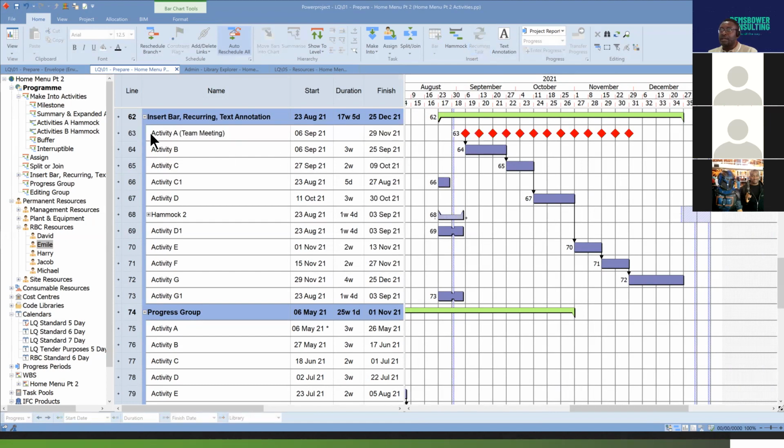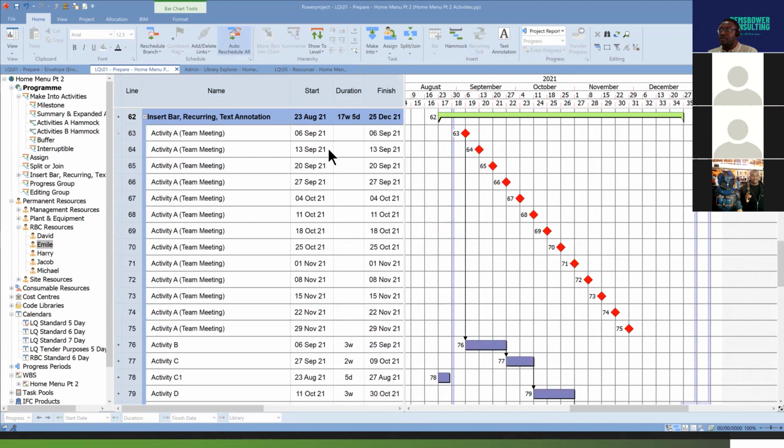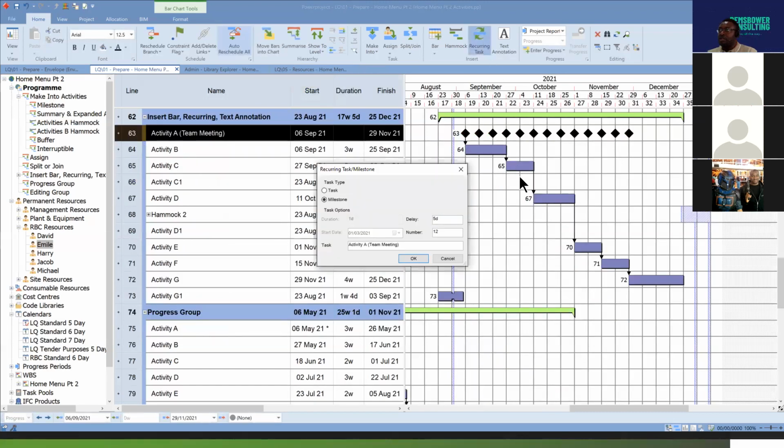So that's it. If I click on that, the 6th is Monday. The next one should be the 13th. That's the 13th. The next one should be the 20th. That's the 20th. The next one should be the 27th. The next one should be the 4th of October. So you can see it gives you that exactness in time. It doesn't have to be every Monday. It could be any differential in terms of the delay, so you indicate that differential in the delay there.